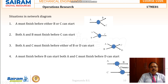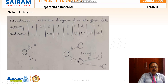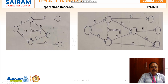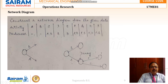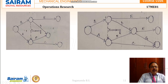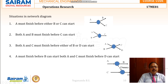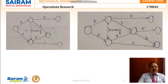Coming to the given problem, we complete the network diagram as follows. A and B are the two activities which can be started in parallel without any predecessor. For C and F, A and B are the two predecessors. For D, B is the predecessor. For E also, B is the predecessor — so after B, we can start both E and D.